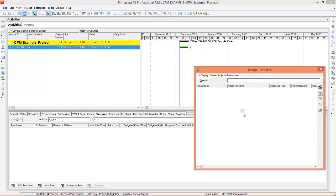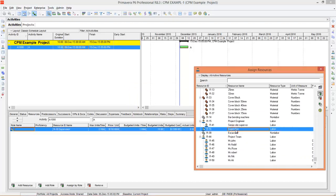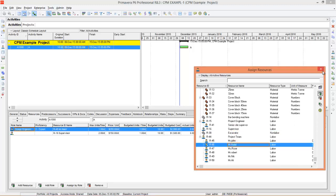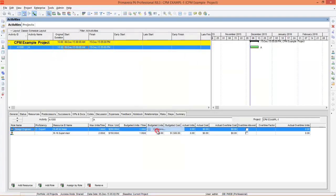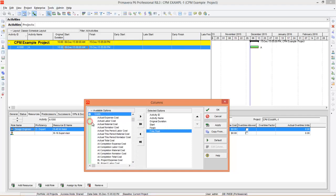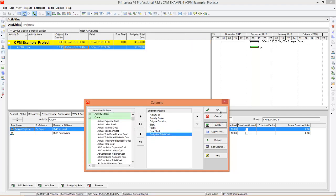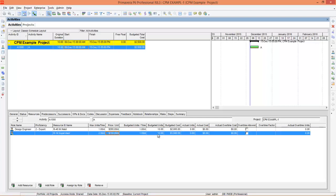Let's assign some resources. I'm going to assign a Supervisor and Mr. Nabil. When you assign resources to an activity it creates cost. To see the total budget you can right-click and add columns — I'll add Budgeted Total Cost, press Apply and OK. The total budget of this project is $3,500. Mr. Nabil's cost is $200 a day and working for 10 days makes $2,000, and the Supervisor's cost is $150 a day and working for 10 days makes $1,500. So the total cost is $3,500.